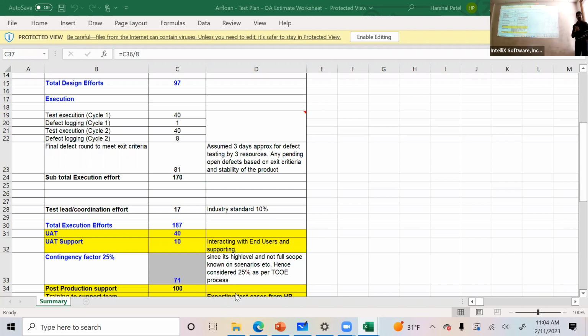So it's the tester's job to come up with this. Quality assurance persons, right? If you are alone in the whole project, you will come up with this. If you're part of a group working on that project, whoever is leading it is going to combine everybody's input to come up with a singular version. They say, hey, you're responsible for testing the managed dealer functionality. So you look into that and say, in order to test that managed dealer functionality, what effort do you need? Then they will add everybody's effort together to give one single number.